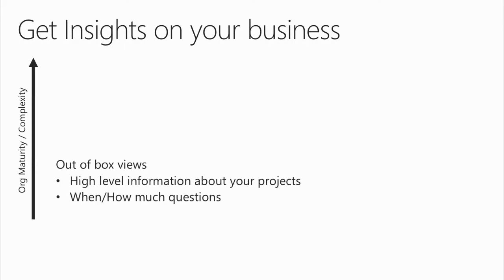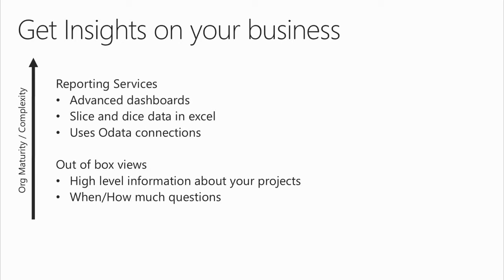The first thing that people don't think about: when you think reports, everyone automatically jumps to the pretty sexy Excel reports that they showed. But the first line of defense in reporting is the out-of-box views. If you look at the Project Center, the timeline gives you an overview of how your projects are laid out. You can do filtering, sorting, grouping in there just to get a gist of where things are in a grid view and a Gantt view. But if you really want to deep dive, you go into the reporting services and start building some of these reports that Mike showed in the keynote, and you have a lot more detail in there at a higher level.